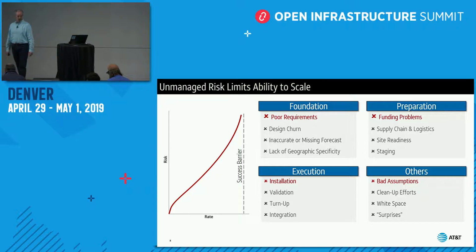Whitespace problems. These are things that you basically never even anticipated in your plan. Nobody did. And then you discover them along the way. How do you deal with that? Things that maybe in the supply chain, you had no idea you needed a contract. You've never done this before. You just thought you went and purchased servers. Why do we need a contract? Well, because we're going to buy in huge volume and we're making a huge commitment on these new suppliers. So we need a contract in place. Well, how long does that take? 6 months. Whoops.